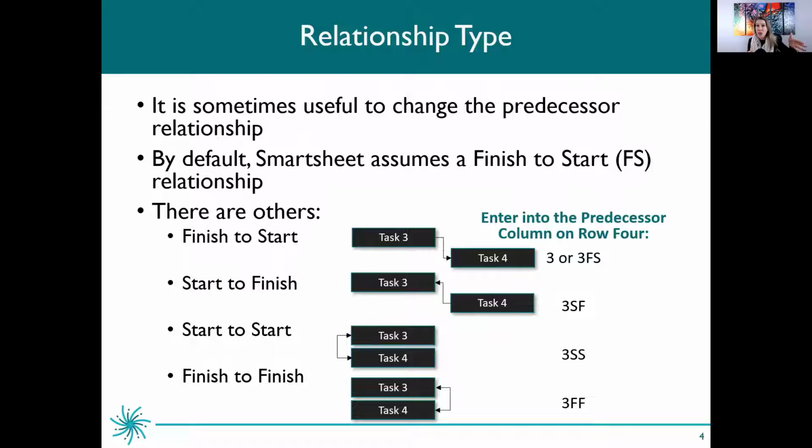So when we start setting up the venue, we finish ticket sales. So we could enter that into our project schedule with an SF. So we would put 3, if 3 is the row that we want to use as the predecessor task to another, we would put 3 as the row number and then SF to have that a start to finish relationship.